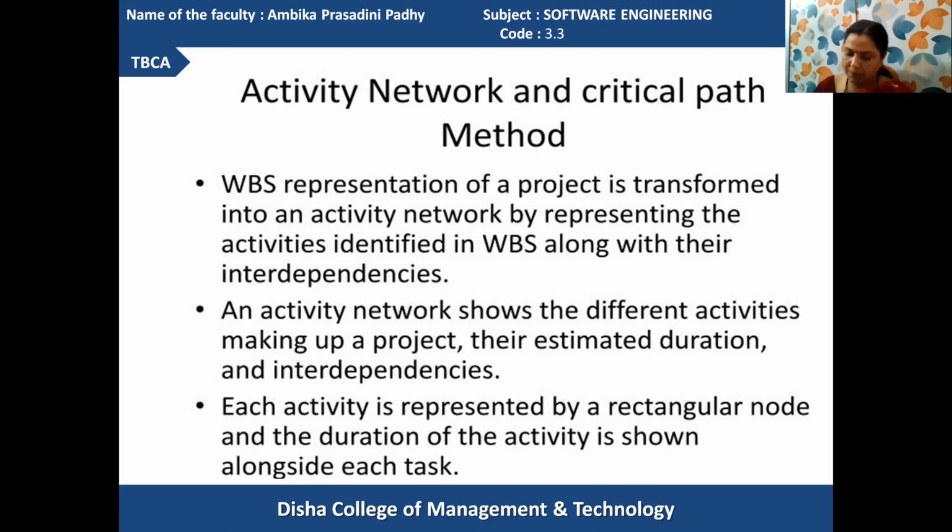And the critical path, you can say, is the path from the start node to the finish node. Whichever jobs must be executed in a critical manner are summed together and provide the critical path result. Got it? The path that equals the maximum time required from the starting node's execution to the ending node's execution is calculated as your critical path value.